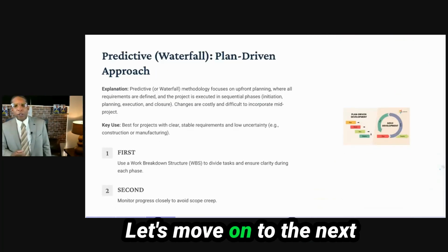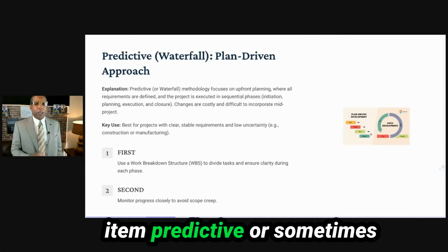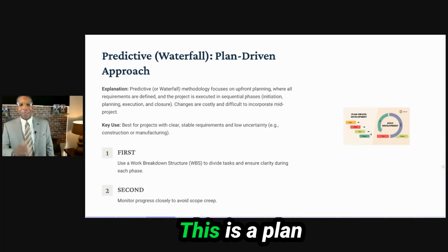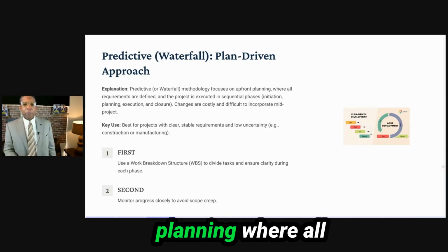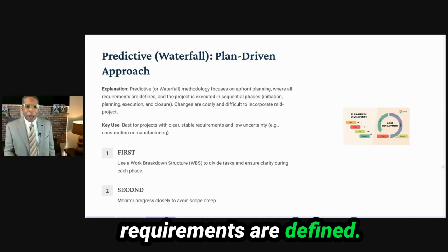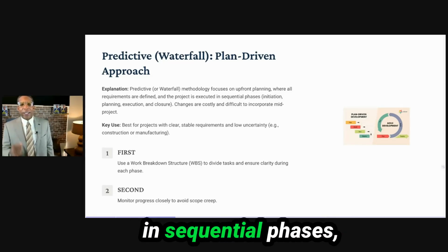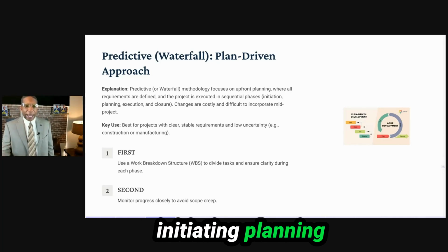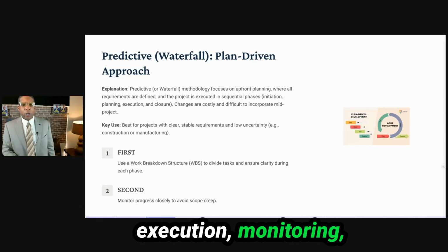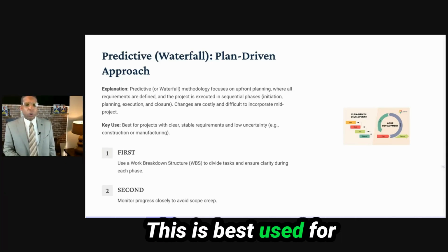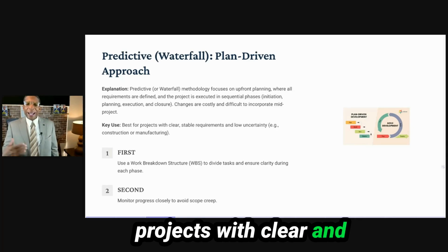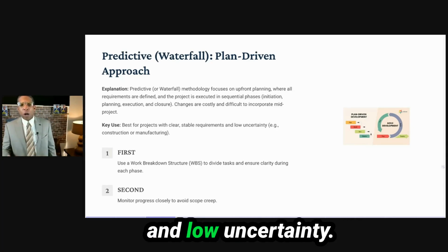Let's move on to the next item, predictive, or sometimes what we call waterfall. This is a plan-driven approach. This methodology focuses on upfront planning, where all requirements are defined. The project is executed in sequential phases: initiating, planning, execution, monitoring and controlling, and closing. This is best used for projects with clear and stable requirements and low uncertainty.